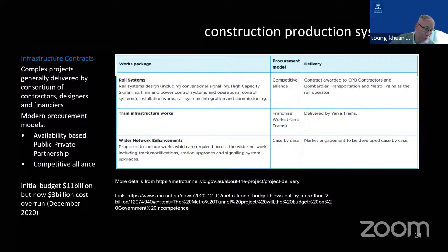Right? There is no place to throw the waste. There is no allocation to treat the waste. And most of the project assumptions were given by the government. So the government said that the volume of soil to be remediated is maybe 10 million cubic meters. But when they actually dig the soil up, there is 30 million cubic meters. They are following the contract. They say that the government estimated 10 million cubic meters, but upon running the contract, it is found to be 30 million cubic meters. Now, who is responsible for the error?